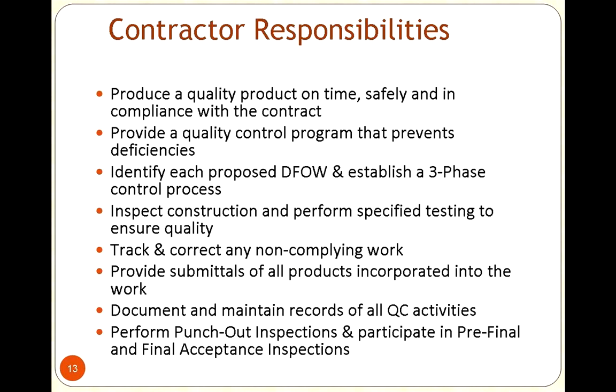But it's things like that have to happen along the way, that if you define the work and hold their feet to the fire and something needs to be changed, you can legally say, we told you A, B, C, D. You didn't do C. Go back and do it on your own time, your own dime, and that's just the way it's got to be. So being able to identify those things and ensure it is critical.